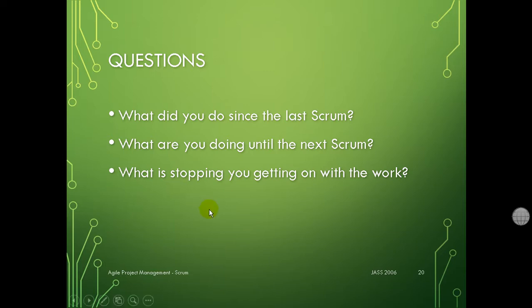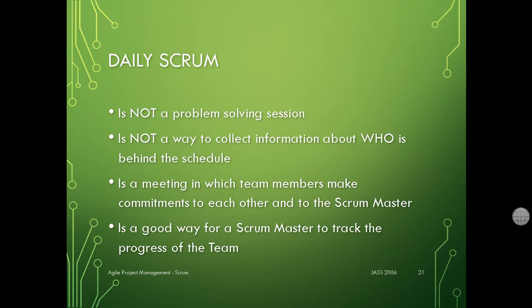So, to get back to the context, we have seen the sprint planning meeting, right? Then the daily Scrum meeting, after seeing the sprint itself. So what's next is the daily Scrum, the specifications of what should happen. It's not a problem solving session. It's just to present what happened and to let the Scrum Master know what the problems are, but he's not going to solve it in that meeting. You should know about them, then solve them later on.